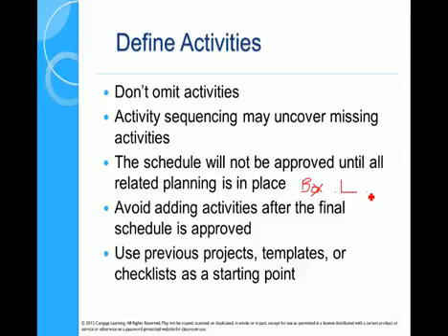We need to make sure that we've understood what the risks are, what the quality requirements are, what the financing requirements are, where our resources are coming from. So we can't baseline a project. We can't decide what the final schedule is until we've thought about all the related planning. So that needs to be in place.